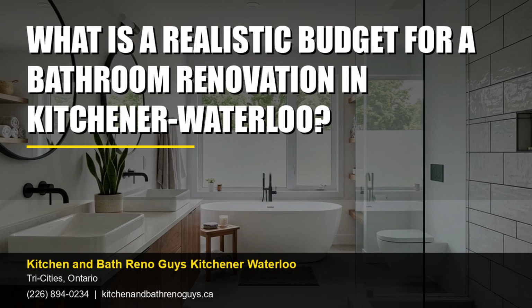Research and select materials that offer the best value for your budget and aesthetic preferences. Get multiple quotes from reputable contractors to compare costs and services. Plan for unexpected expenses by setting aside an additional 10 to 15% of your budget as a contingency fund. Ensure all necessary permits are obtained to avoid legal issues and additional costs. Work with a contractor like Kitchen and Bath Reno Guys to gain insights into cost-saving strategies and high-quality material options.